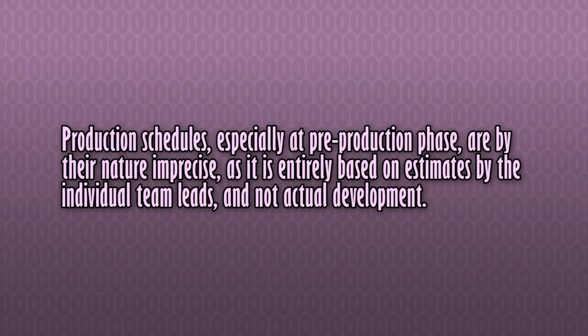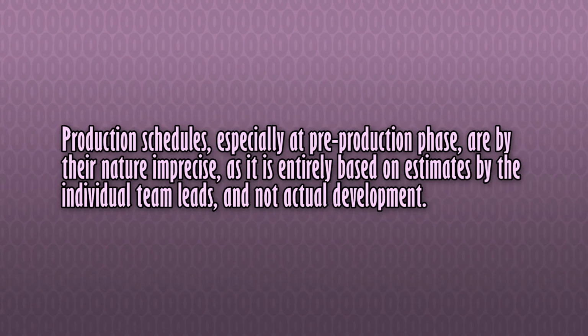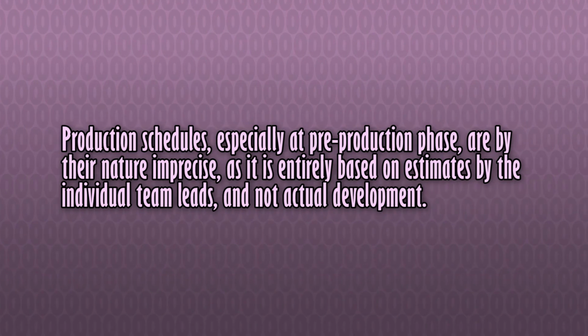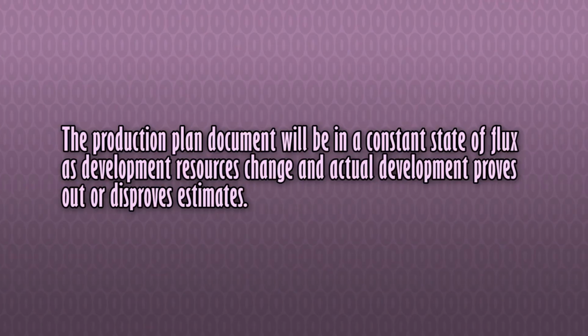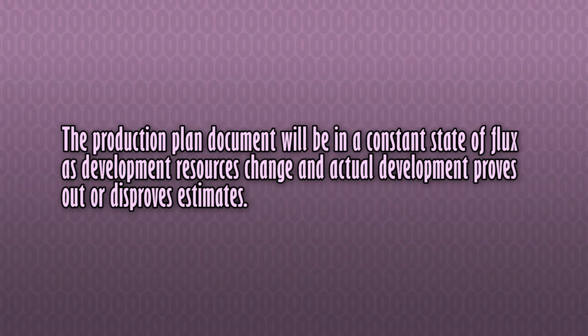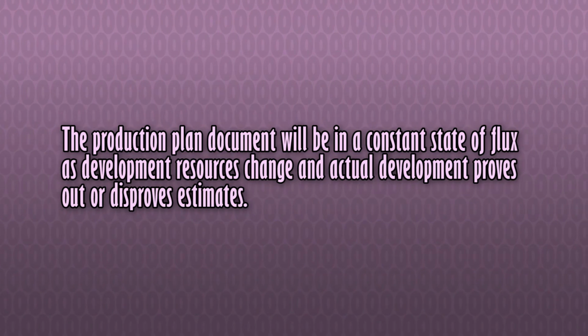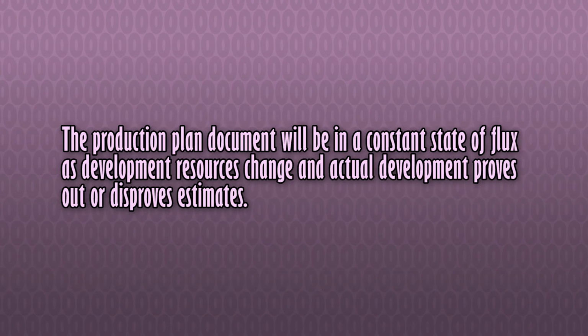Ultimately, the savvy producer will know their team well enough and create buffers for development time. I always worked from the perhaps pessimistic credo of take whatever you think it will take and add 20%. This is going to be a living document, of course, and in practice, many development environments won't adhere to this schedule, as odd as that may sound.